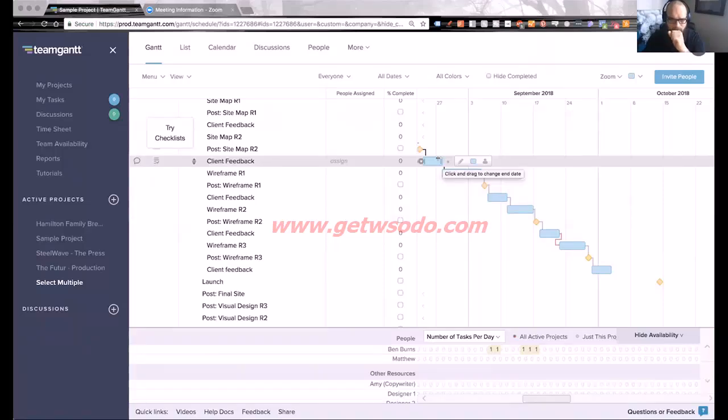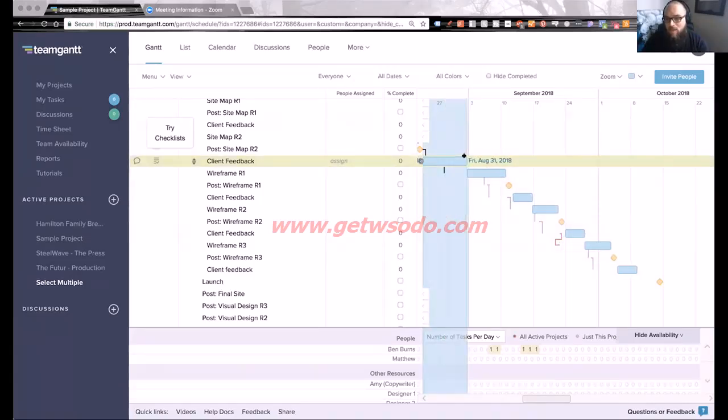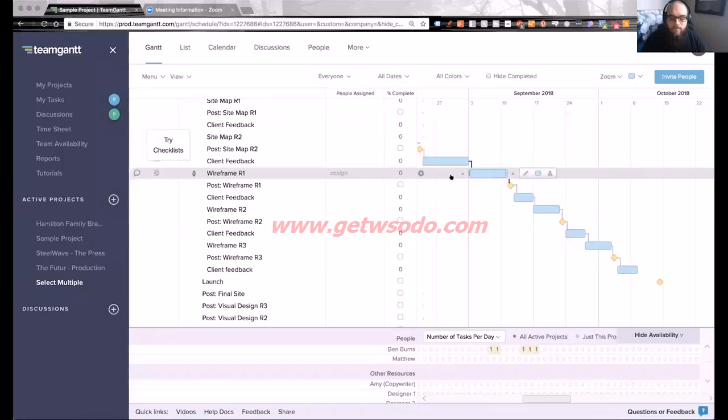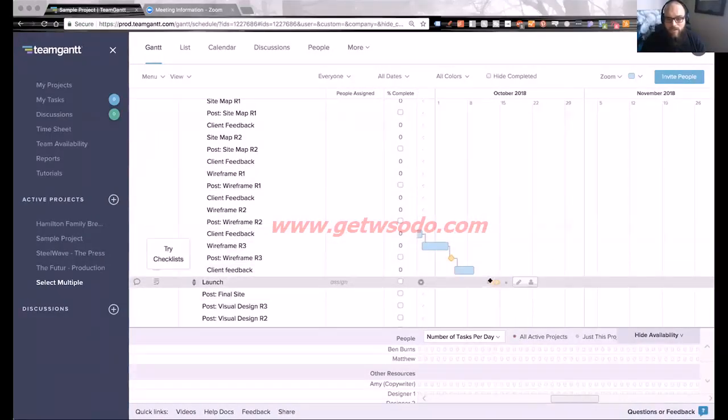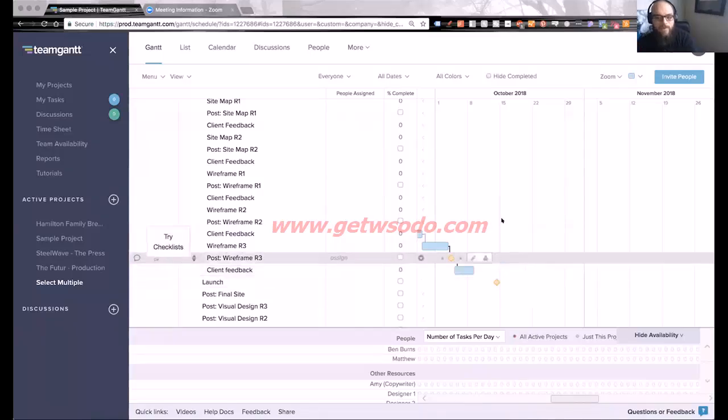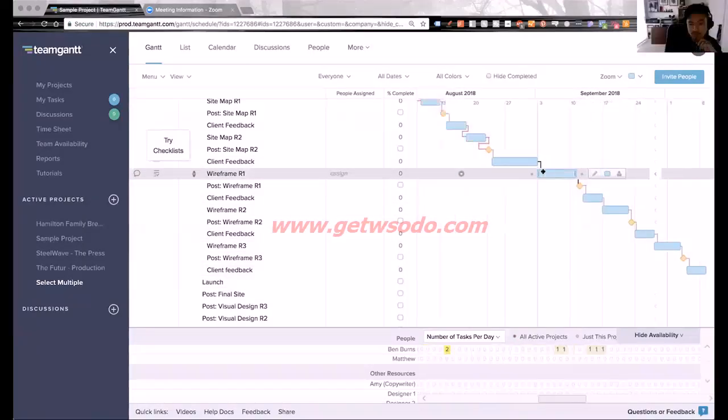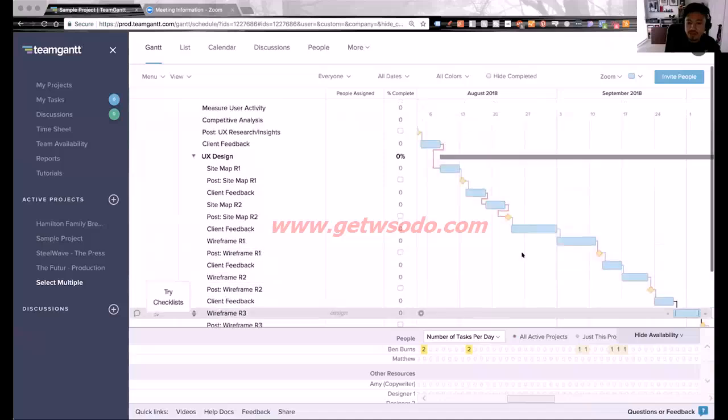And when the client decides to take longer for feedback, which is a pain point that everybody experiences, we can literally say, hey, look, check the Gantt. If you guys want a couple of extra days, that's fine. But we're going to need to either increase the project fee, or we're pushing our launch date farther and farther out. So it's up to them. There's two things that could happen.